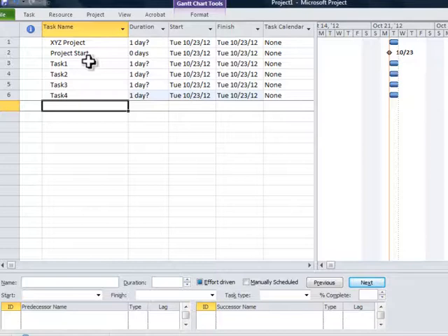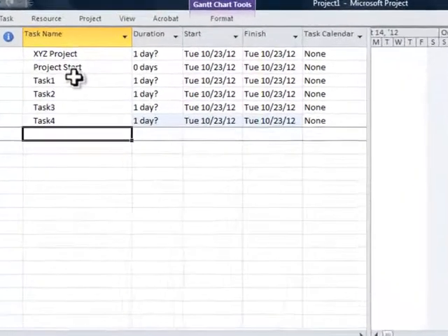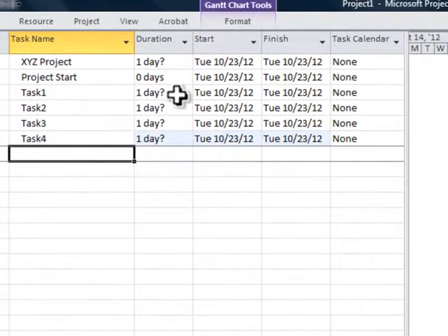Basically, we don't want to have any spaces between the schedule activities, because the scheduling software views that space in itself as an activity. And so the fewer spaces you have in the schedule, the better, especially when you go to export the file to other software, which could create some problems. So you can look in the duration column and see that the duration of 1 day is plugged in as a temporary placeholder. This is what we've set up in our project defaults as an estimated duration.